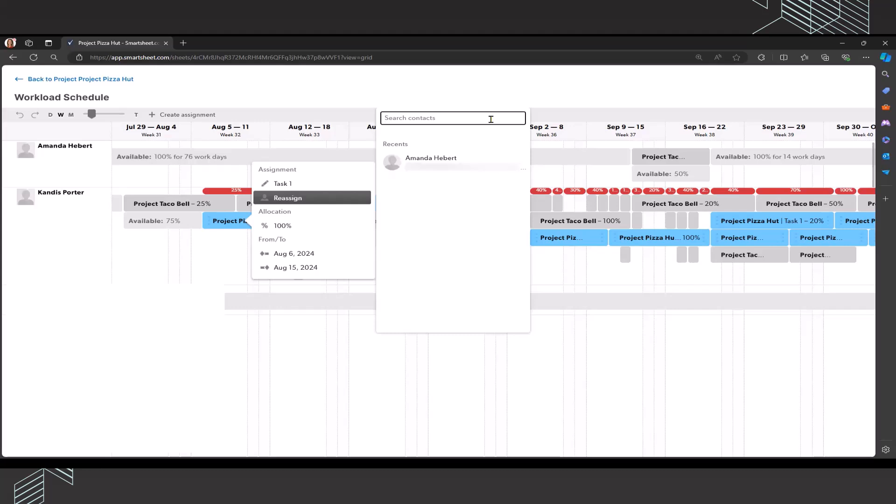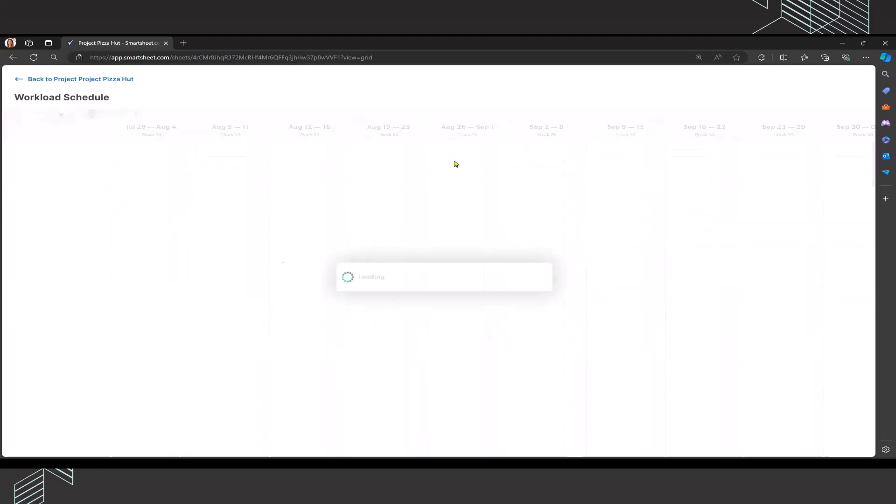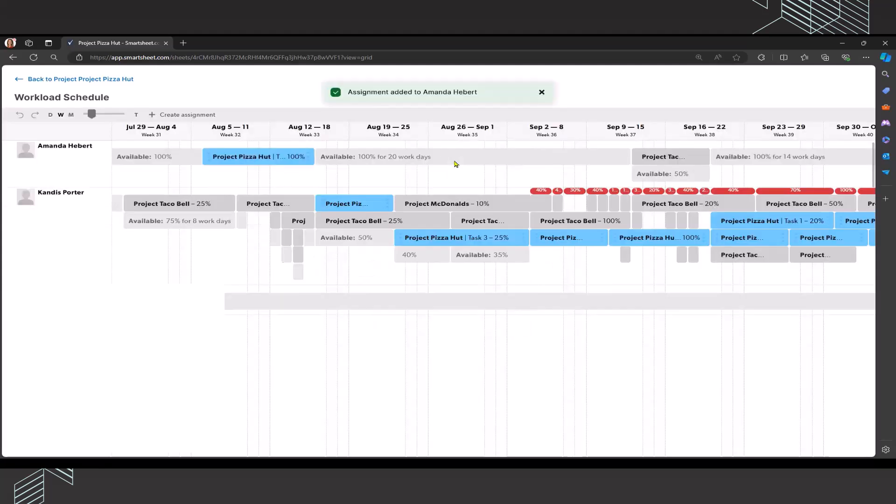I know that she has the skillset to take on task one and she believes that she could do it in the same number of days or duration that were originally assigned to me. Once I've confirmed that I can go ahead and reassign it to Amanda. So I'm going to click reassign here.